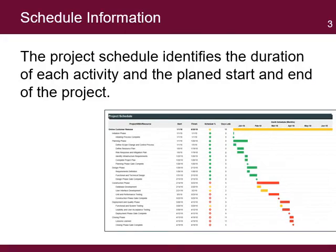The project schedule identifies the duration of each activity and the planned start and end of the project. Information to create the schedule comes from the WBS, which has all the activities identified for the project. The quality and completeness of the WBS will determine the quality of the schedule.